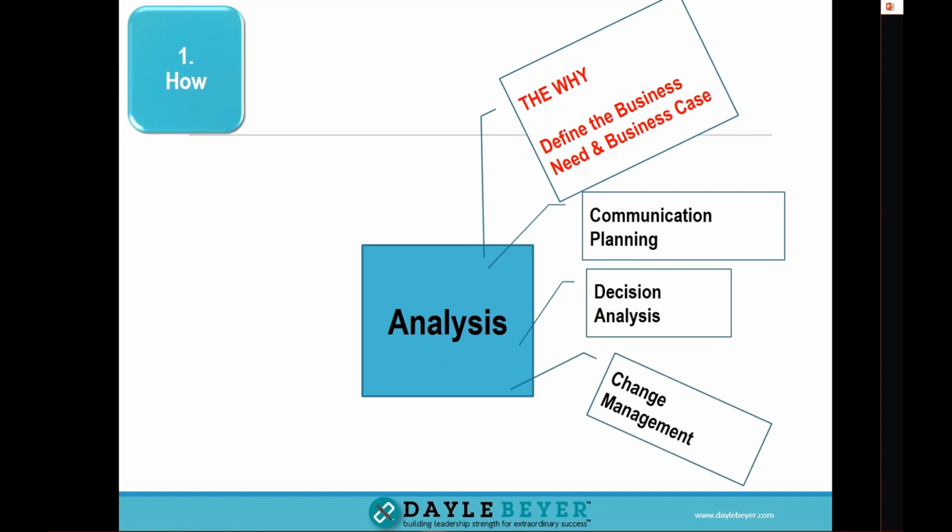Also, we need to know change management. Now, change management happens very differently, whether it's a waterfall predictive approach, where you have a formal change management process. If it's an adaptive approach, change happens when we can put our user stories into our backlog and reprioritize our user stories. But we have to understand, why do you want this change? How does that tie back to the business need? Just adding in user stories as they come along isn't valuable enough for the organization if we're working on the wrong things.